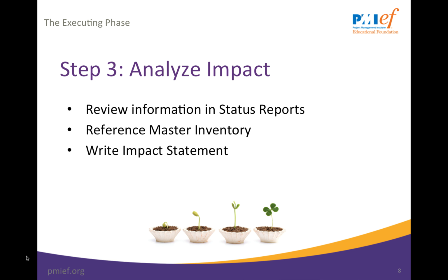At the end of the analysis, it is typical to write an impact statement that indicates any action items that are recommended to address some of the shortcomings and any expected future impact, possibly negative or positive, of these actions. These actions may include applying more resources, applying more time, changing the deliverables, or other adjustments.